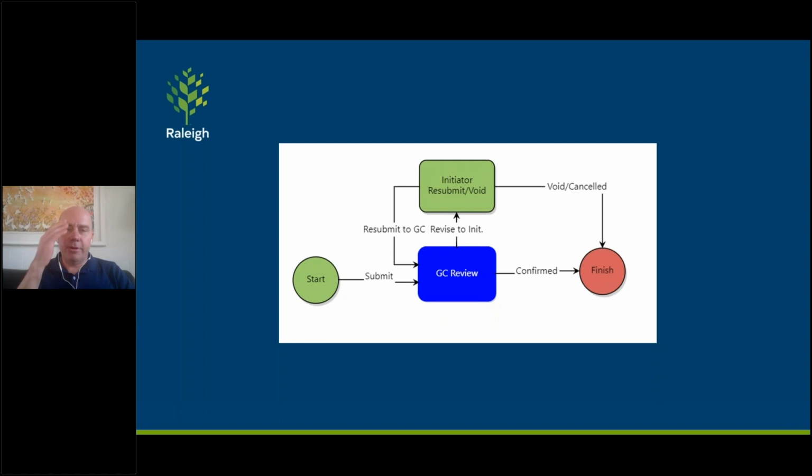Here's another workflow example. This is our IDR, Inspector Daily Report workflow. So the inspector, in the start step, fills out his IDR. He's marking line items for an active construction project for materials, quantity, and cost being used that day. And he'll mark that, and that's pulling from the line item from the commitment.